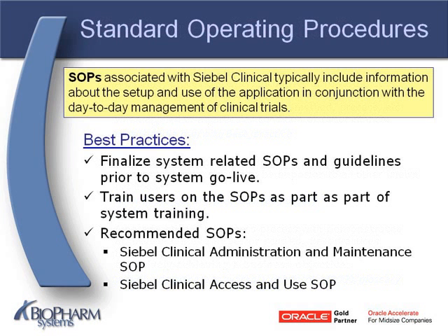Standard operating procedures, always a favorite topic of everyone's. Ideally, an analysis and review of your organization's current business processes and any existing gaps were performed during the requirements gathering and design stage of your CTMS project. This type of analysis should always be performed early on in a project of this nature. In that way, during the implementation, you have a chance to update your SOPs and work practices in relation to the application that is being implemented, in this case, Siebel Clinical.